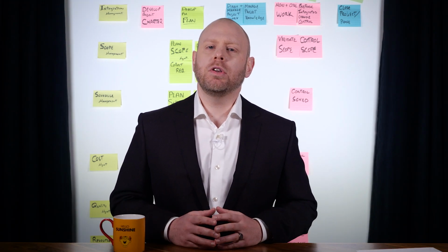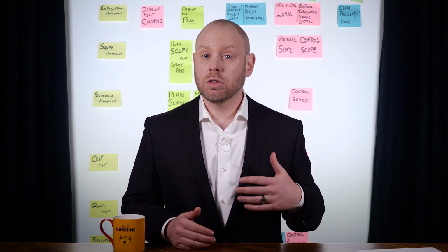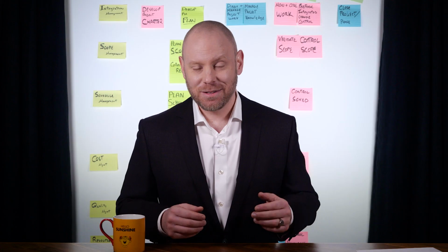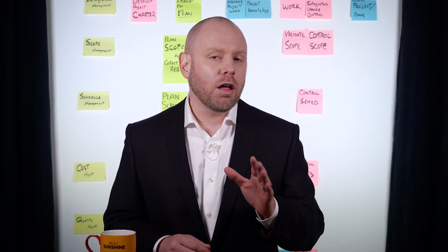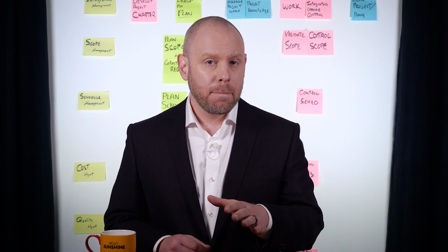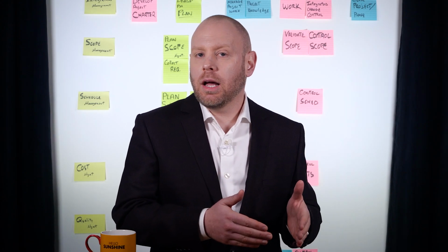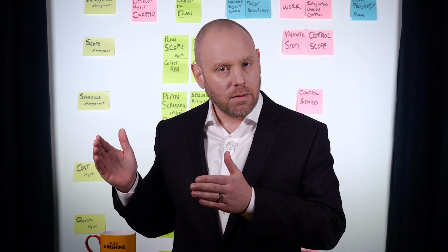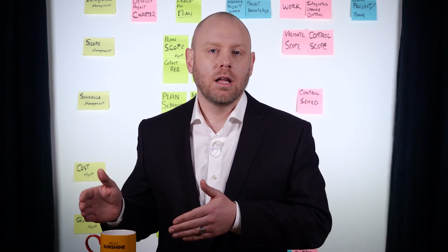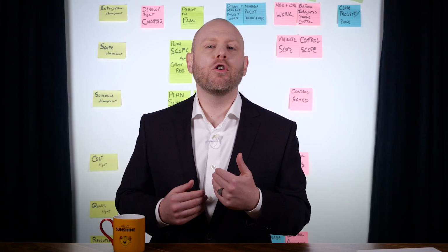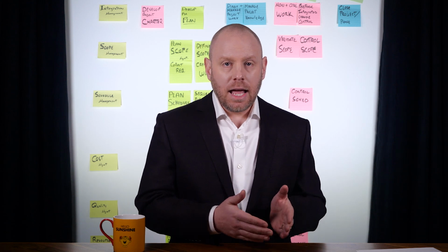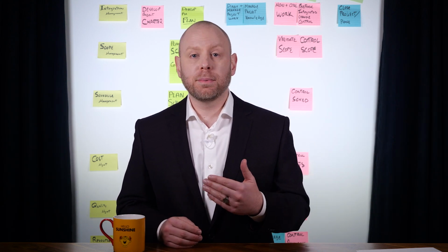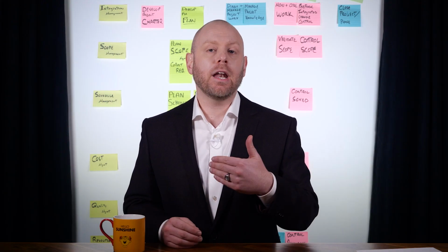Document analysis is a review of the plans, assumptions, constraints, previous project documents, contracts, and technical documents. Is the technical specification on the edge of your capability? Can you only meet the processing timeline with 100% attendance or productivity? Did the last project like this fail or succeed? And what were their lessons learned? Informed by our expert judgment, data and analysis, and through meetings focused on risk, we will be able to produce a risk register and a risk report.